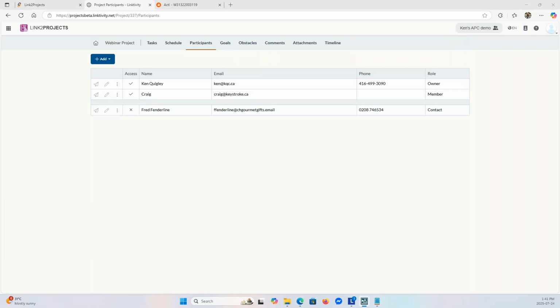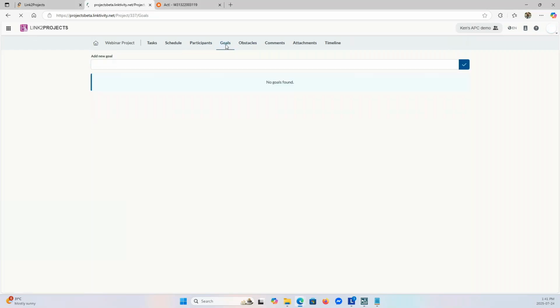Okay, now let's go through quite a few of the others. Now the goals, as I said, pretty straightforward. What is the objective of this project? Okay, it may seem basic and obvious and like a hoop that you're jumping through, but getting everyone aligned on this with the customer and the team can really help avoid what I was describing as scope creep, okay, which can threaten projects. If the goalposts are being moved around by the customer, that's going to impact costs, that's going to impact timeline. This is extremely important to get articulated.